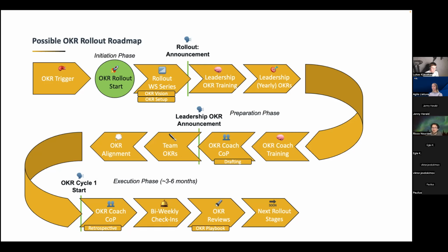And if you check your progress, you can also adjust your backlog. And if you adjust your backlog, then you're probably doing the right things first and you get the value you want to. After that, I also want to have OKR reviews, so inspecting and learning out of the objectives. And I also always have some kind of OKR playbook, what I'm maintaining in the background, so that the other departments, other teams are learning from each other. So that's for me a good practice.